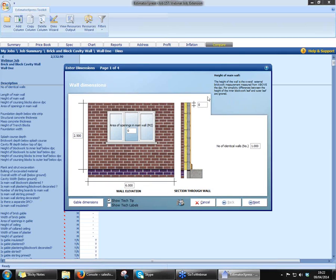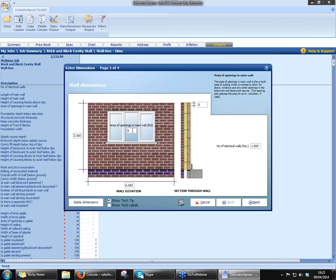And this, guys, is a dimensions wizard. This is how pretty much all of the calculators in the software work, and it's dead easy. You've got your tech tips — this is the information at the top here. As I click through these boxes, you'll see that information change. So this one here is the length of your main wall. This one here is the height of the main wall, and you'll see that it's set to an industry standard of two and a half meters. And areas of openings in the wall — what that's doing is it's taking away the amount of bricks, the amount of trade it would have taken to lay those bricks. Same kind of thing with your wall length: if you've got a six-meter wall front-facing, a three-meter wall on each side, instead of doing three separate walls, bang it in there as a 12-meter wall — it'll cost it out in exactly the same manner.